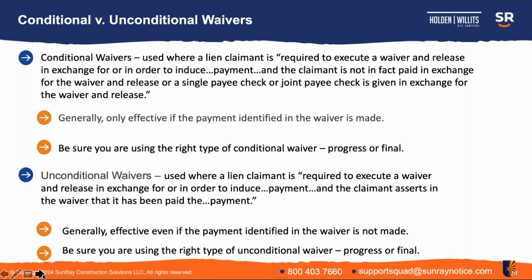I'll say right here with respect to conditional waivers, there is a prevailing notion, and some people call it lien waiver math, that when you have a conditional waiver that says I'm releasing my lien rights if I receive this payment, and you have that actual payment, you put those two things together and it effectively operates as an unconditional waiver, because the condition that is set forth in the conditional waiver has been satisfied.